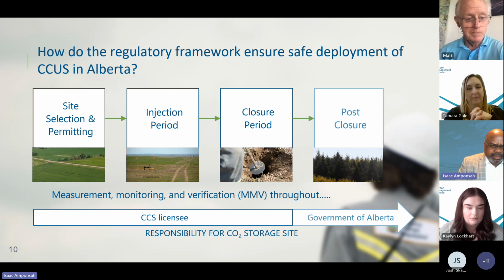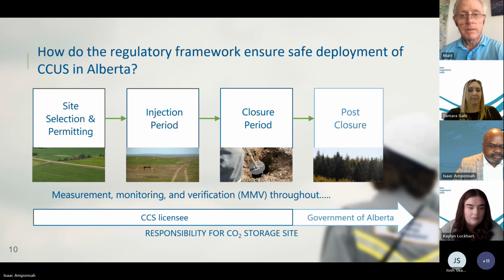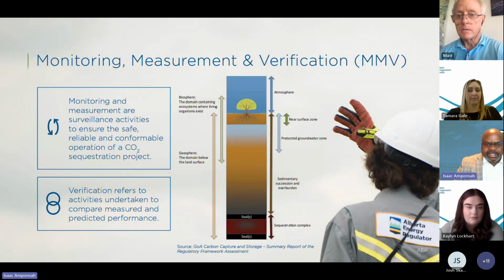I have to mention that the MMV has to be renewed or updated every 3 years, and there's an annual report that is submitted annually. We do have currently on our website Shell Quest and Enhance Energy's MMV and annual report. So if anyone is interested, you can Google that on our website. But it's transparent and the public can see it for themselves. So I thought I'd shed more light on the MMV here.